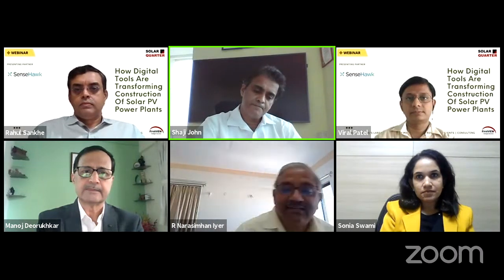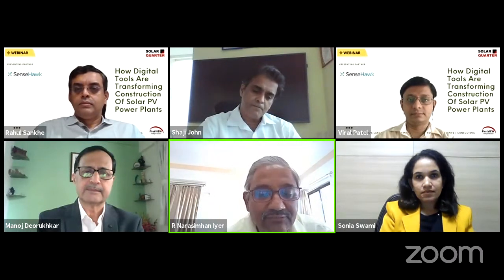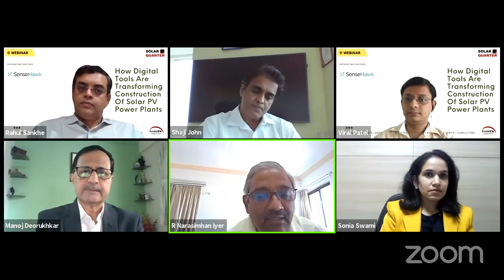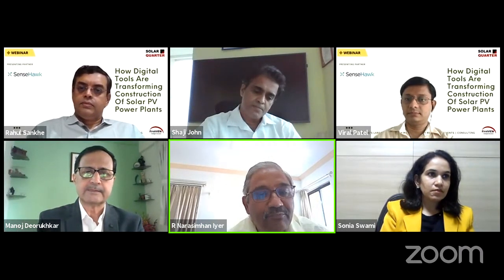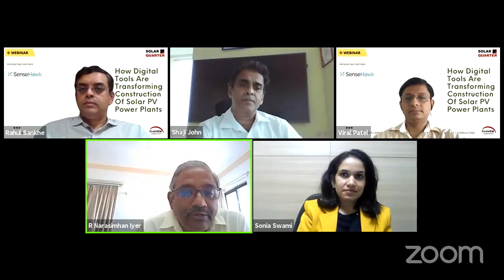Thanks for giving me this opportunity. I've been in this solar business for the last 10 years. I remember the day when we from Schneider were doing the first 5 megawatt plant. That took more than 7 months. Now the run rate is more than 5 megawatts a day. That's the kind of speed and volume it has become over a period of time.